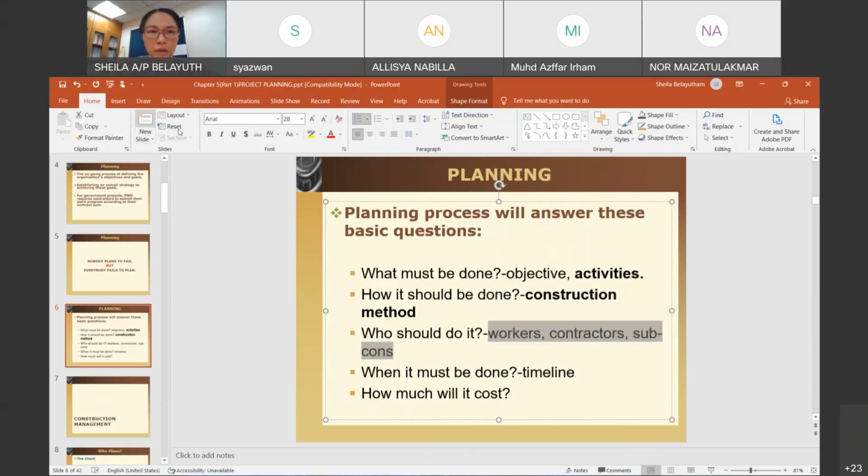So this is quite heavy. Okay, because every small trade, though, okay, so concreting might differ from installation of rebar, and it will differ from formwork personnel. So mungkin subcon yang berbeza. Plumbing lagi berbeza, and then bricklaying might be different. So you have different subcon that will work on your different activities with the method that you have actually identified.